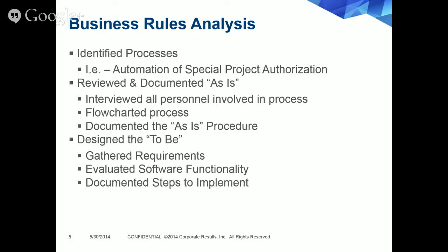So the first thing that we did was we documented and reviewed the as-is process. We did some brief interviews on who was involved within the process. We flowcharted the process, and we documented how it was being conducted before the automation. And then we designed the to-be process.